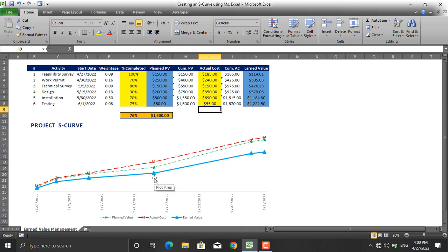Because the earned value is less than the planned value and it's less than the actual cost, which means that the project is both behind the schedule and over budget.